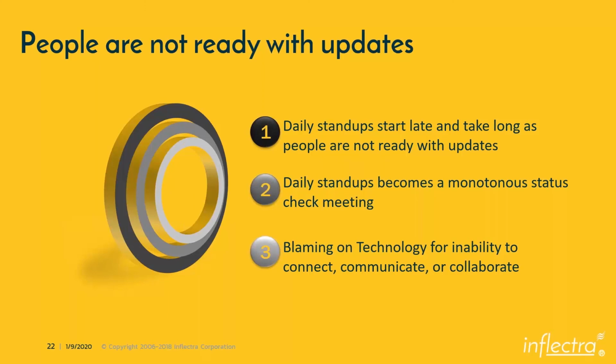On the other end of the spectrum, people basically have to be asked these 3 questions. So when I turn to the other person, I have to literally ask, hey, what did you do yesterday? Hey, what are you planning to do today? What are your impediments to getting things done today? I shouldn't be asking this as a Scrum Master. As I turn around, people should be ready to come forward with these things. I need help with this particular issue. I'm looking for this. That's how collaboration truly happens. The daily stand-up is also another place for osmotic communication and high bandwidth communication to take place, right?